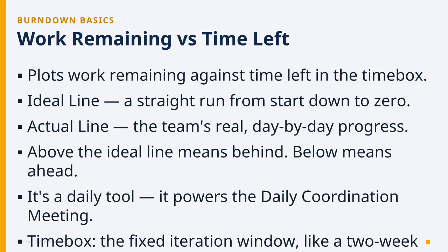And here's the rule to lock in. Above the ideal line, you're behind. Below it, you're ahead. Use it daily. It's the heartbeat of the daily coordination meeting. If the line goes flat, nothing completing, you investigate now. You don't wait to announce a failure at the sprint review.